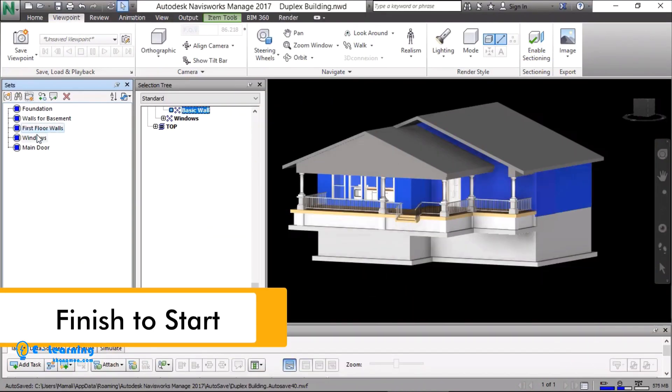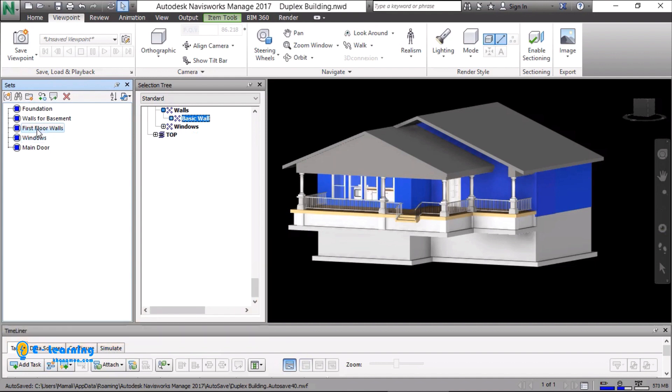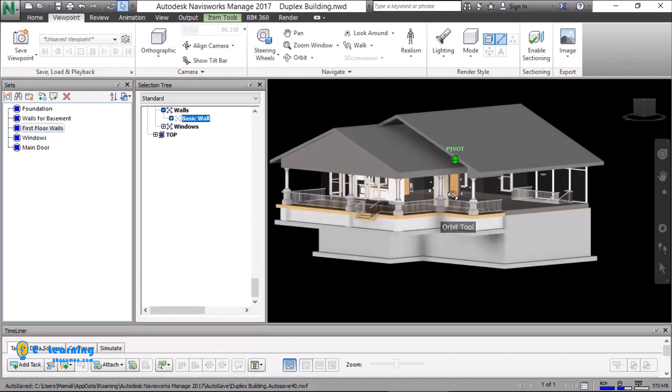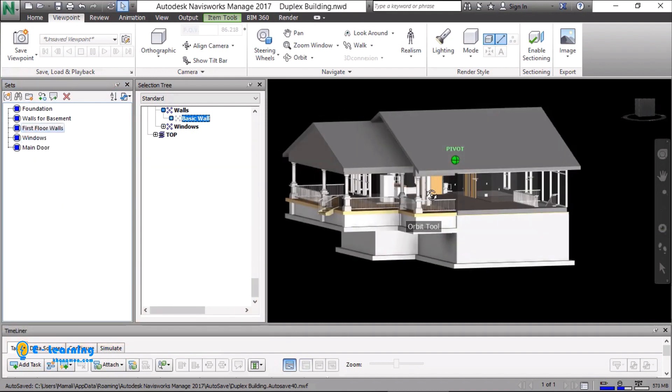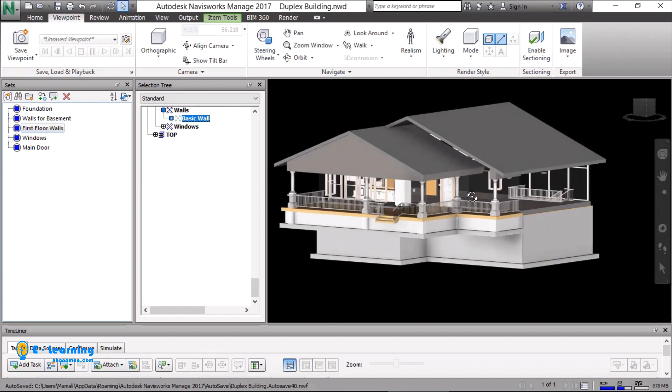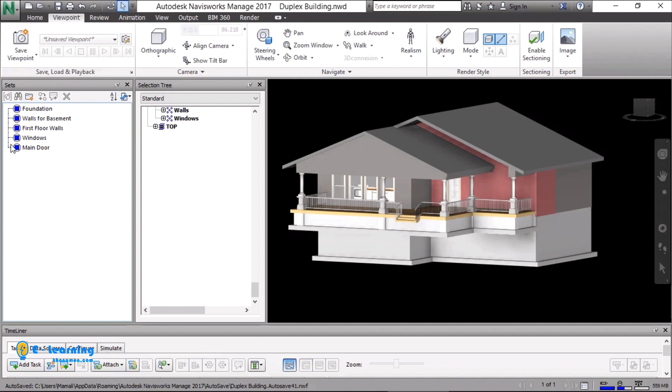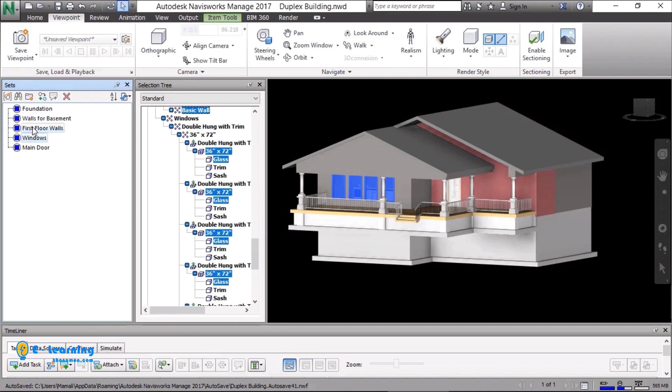Finish to start: You see in this 3D model, without walls, we cannot install windows. So we link windows to walls with finish to start. It means walls should be finished first, then windows installation can start.